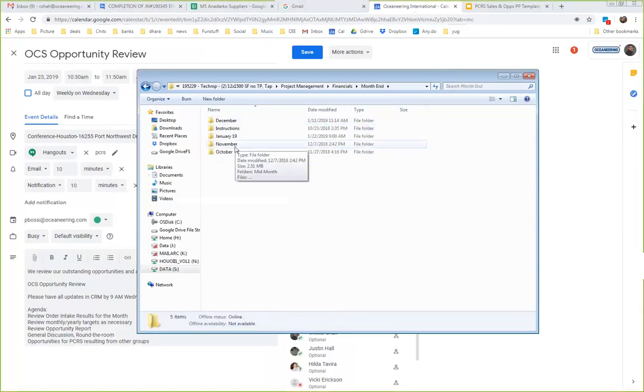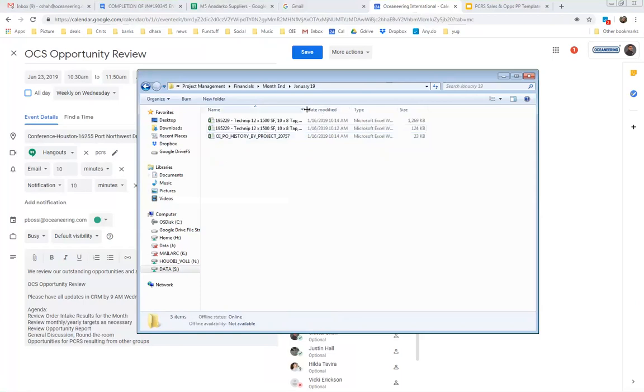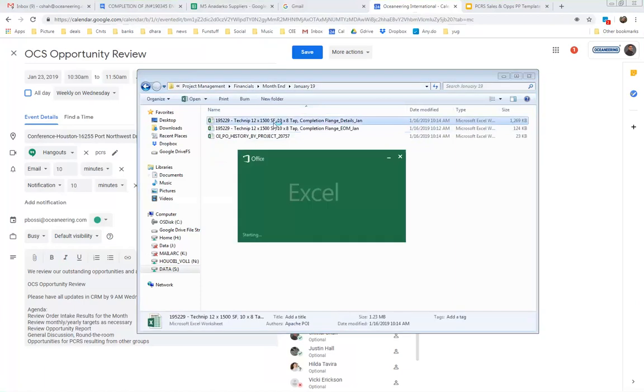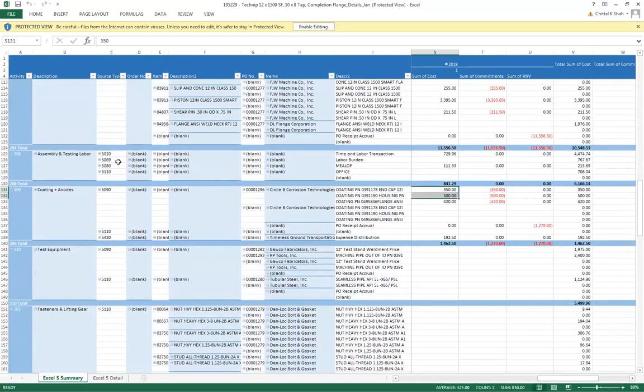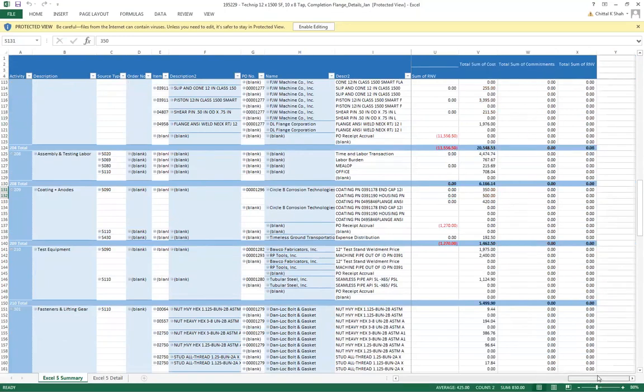We'll close the month, we'll get all the costs on the project, time charged, POs received, and all that, and they will create an end of the month file. There are two files in here. One is the project detail and the other is the project end of the month. Project detail is an automatic system-generated file which goes into PeopleSoft and gets all the costs. For your task 208, you had this and this PO on it, and that was the cost. So it's a detailed report.